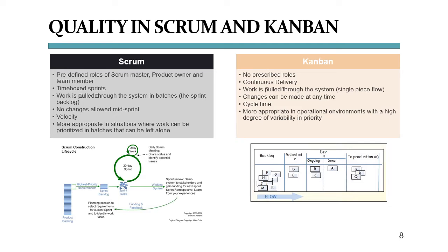While there are more opportunities to catch up if deliveries are being missed, that catching up can quickly occupy too much space in the sprint, so that agreed upon sprint backlog items may have to wait until later sprints, which can snowball into the entire delivery being late. That can produce a lot of stress for developers and engineers and can lead to a decline in work quality and early career burnout. This is where the more relaxed Kanban method might help.